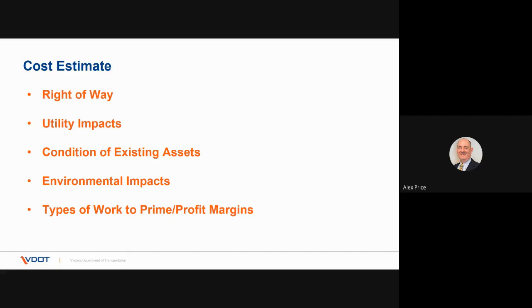When the market is booming and contractors have options to choose the work they bid on, we need to make sure our projects are attractive for contractors to bid on, or we need to realize that it's not as attractive and the cost of this job may increase because there are other projects out there the prime may want to be more competitive and try to win. Hopefully this will increase the number of contractors bidding on your work and in turn increase competition. Again, if we can't do this, expect the prices to be higher than expected.